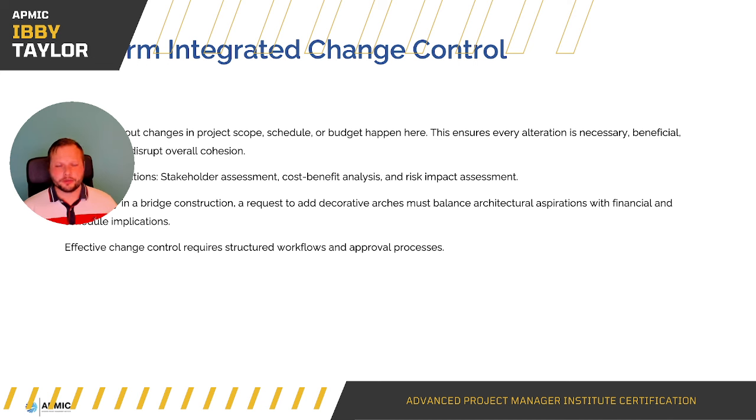But it's all about being a strong project manager, taking initiative, understanding your project and what you need to deliver, and making sure that your change control is relevant, adds value, and will keep your project moving forward. So key considerations: stakeholder assessment, cost-benefit analysis, and risk impact assessment. So midway in bridge construction, a request to add decorative arches must balance architectural aspirations with financial and schedule implications.